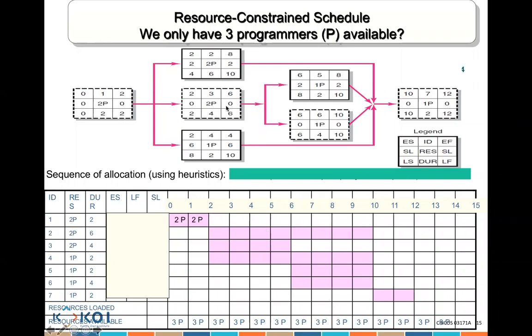Which activity would I do next? 2, 3, or 4? Remember, you have to apply the rules. Why would I do 3? There is no slack time, it's 0 slack time. So I will do that one next. That is correct.